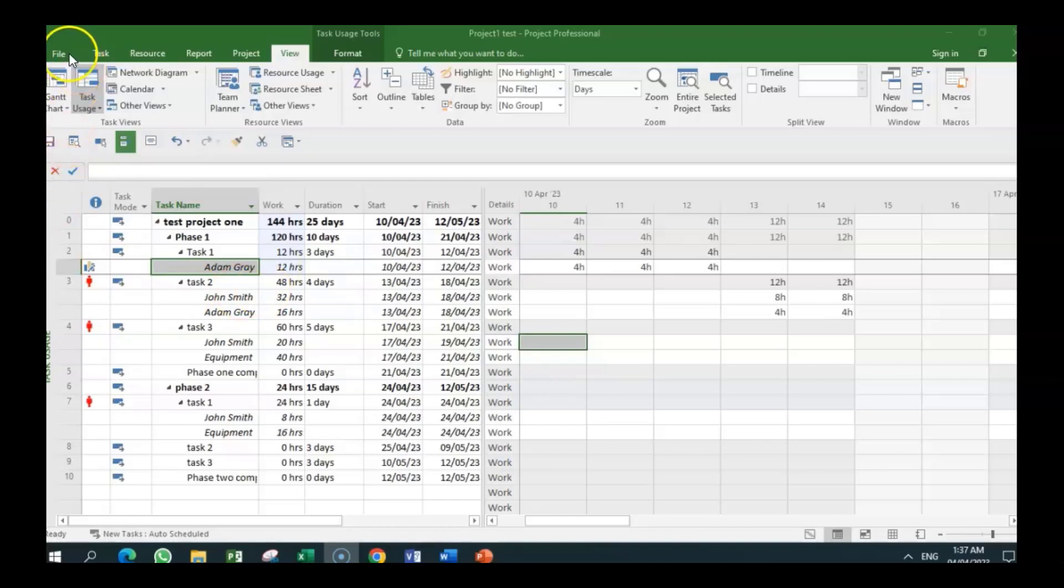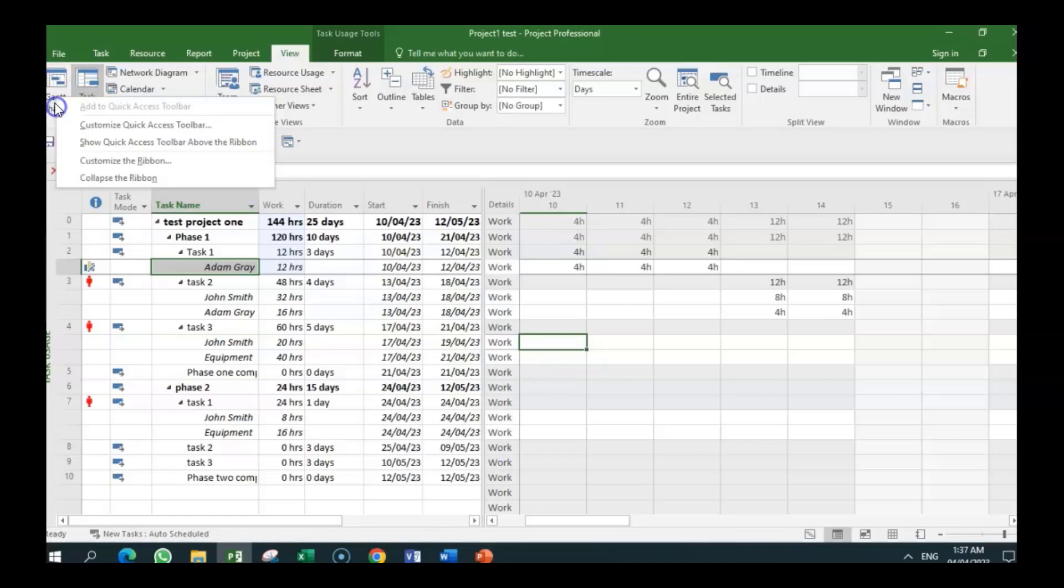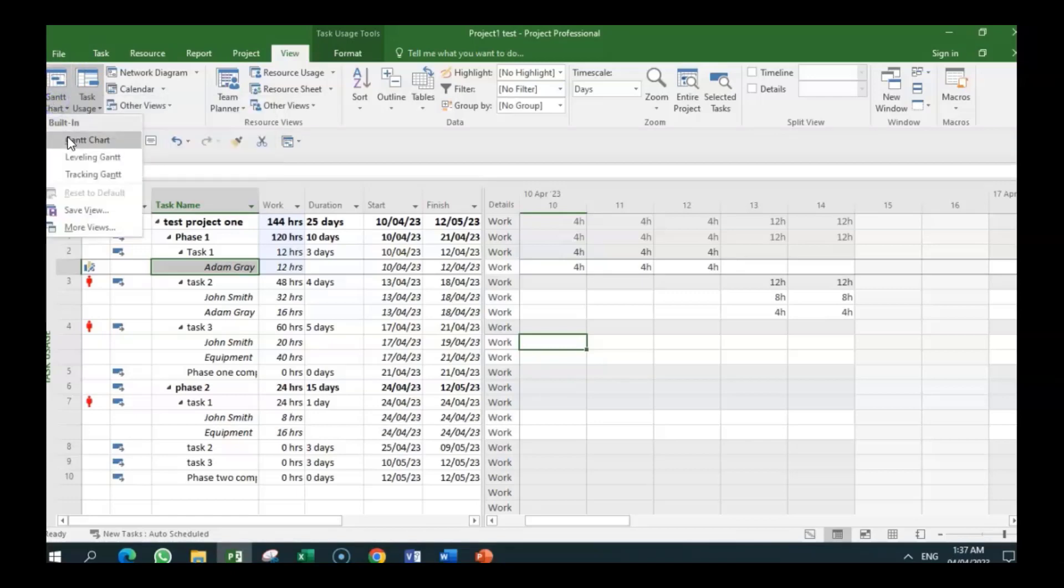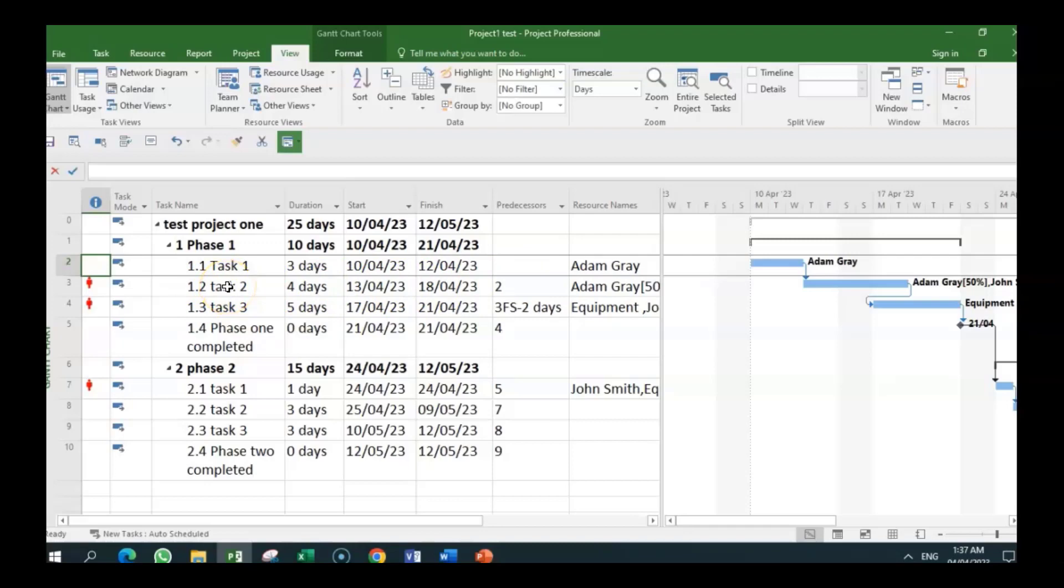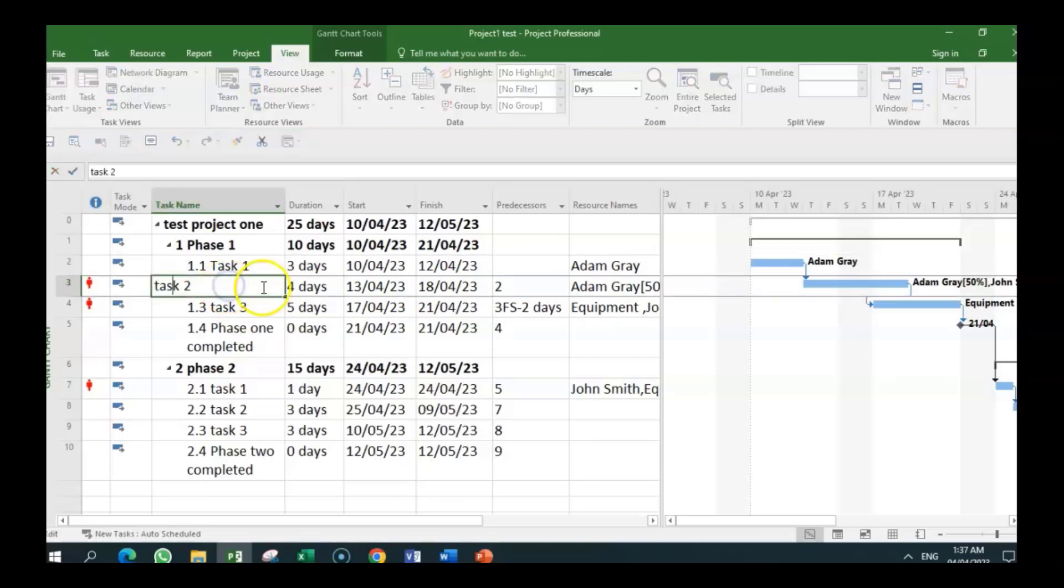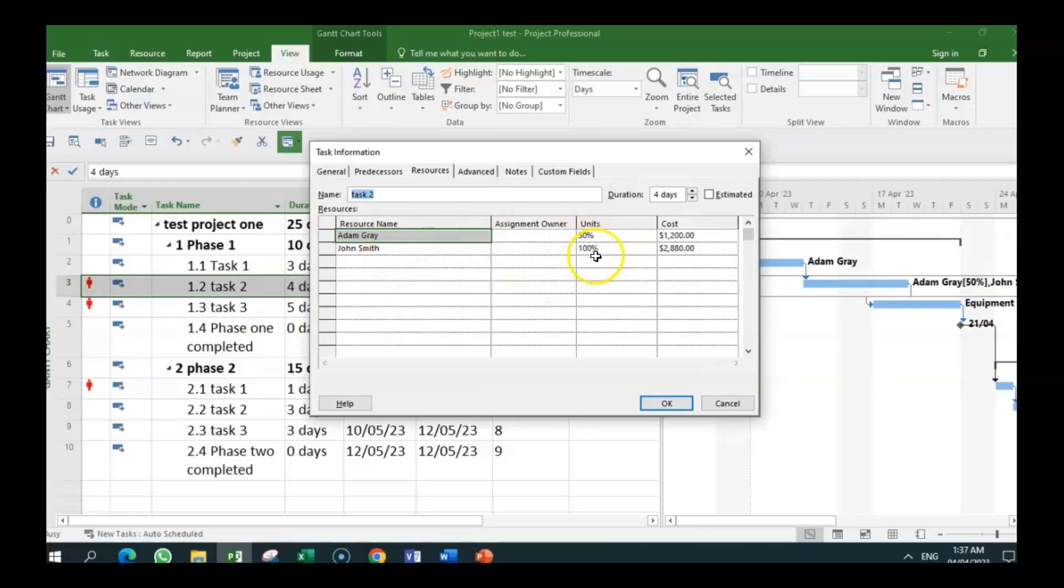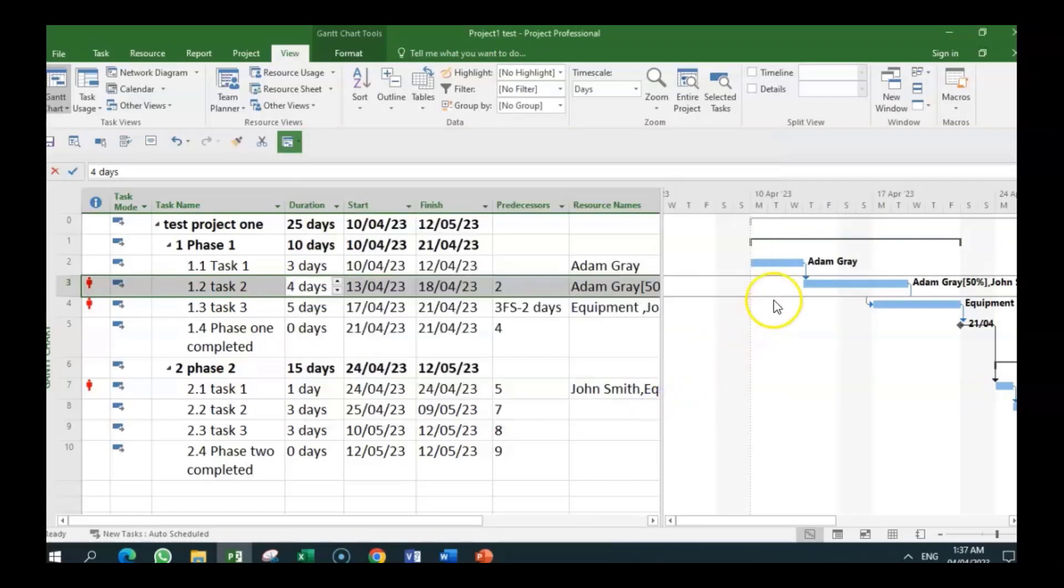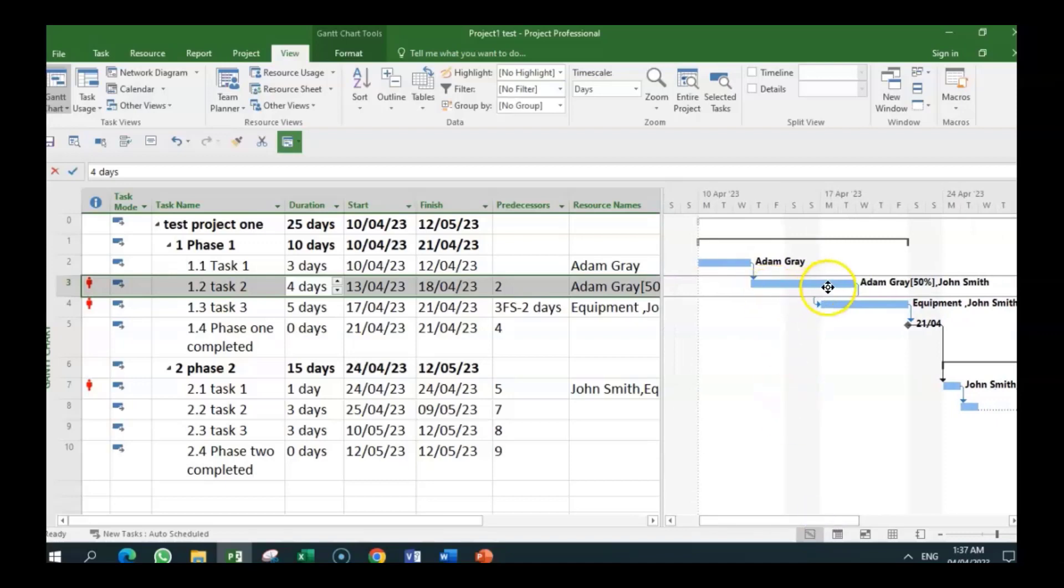So let's go to task two and see what is the situation with task two. Task two, we are also having an over-allocation problem. So one of the first things we could do is to go into the task information to see what exactly is the situation here. So we have Adam with 50%, which is his allocation, and John Smith 100%. So why are we having a problem? So then we look across here. And we can see there is a problem. Let me just bring this across. This is task two. We have Adam and John on it.